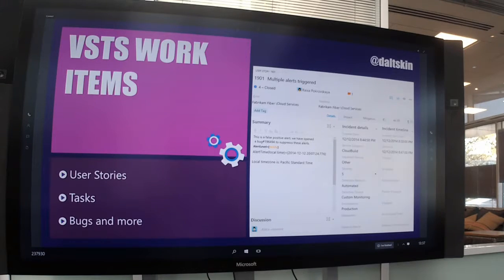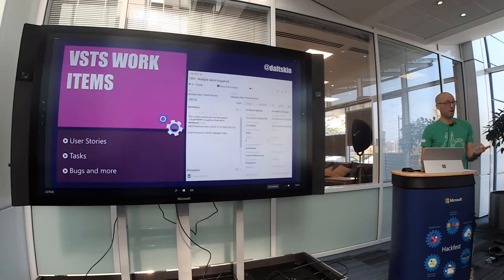When we create tasks, we typically say anything between 1 to 3 days. If you start creating tasks for anything below 1 day, you'll become a management overhead, and developers will hate that. So what's key here is that it becomes light touch enough for developers to buy in, but at the same time gives you the reporting that you need. But for the sake of the Hackfest this week, because we're working in such a condensed time, it's best to break these down into smaller half-day chunks so that you can track each individual piece.